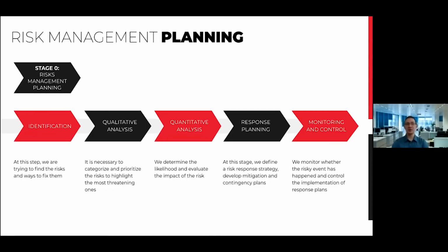Of course, we want to work with risk somehow. Here we have the standard 6-step approach. Step 0 is the risk management planning. At this step, we decide how we will identify risks, what will be the approach to work with them, and who will be the responsible person.